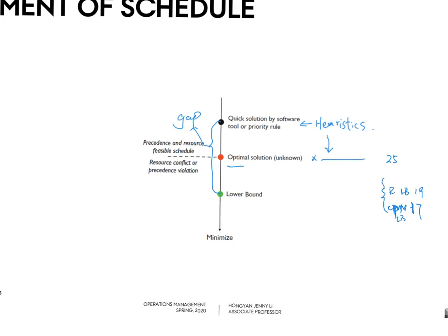The next one, the critical chain-based lower bound, is 21, but these are infeasible. Optimal is 25. I also have a heuristic solution, also 25, from the sequential scheme, and a 27 from the parallel solution.